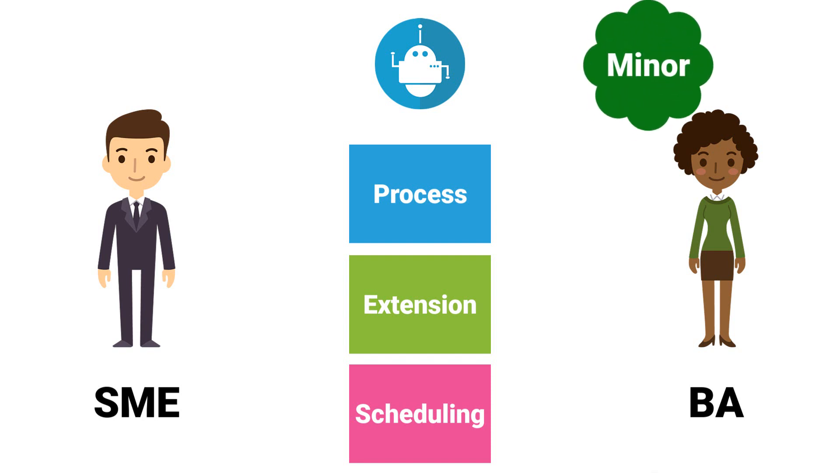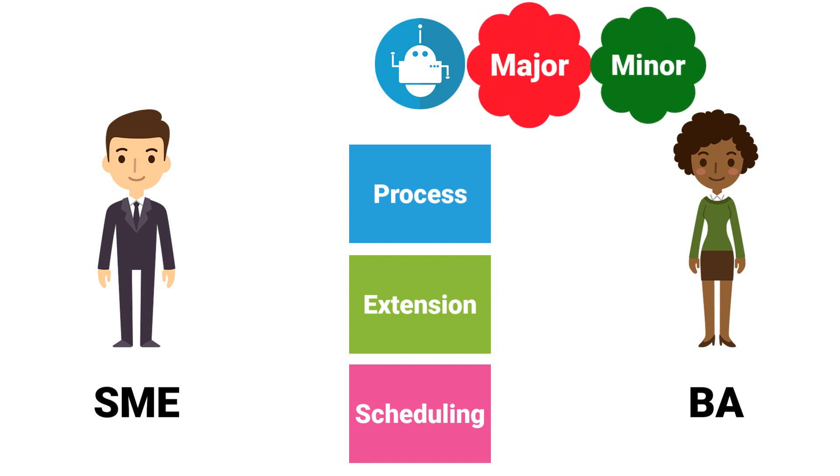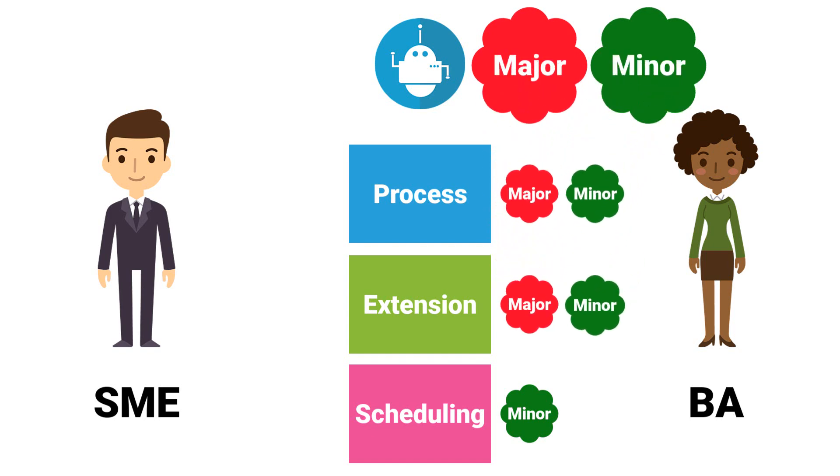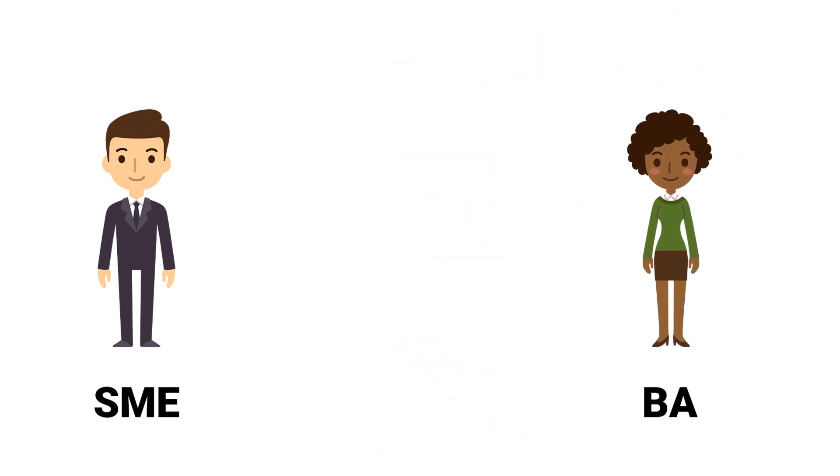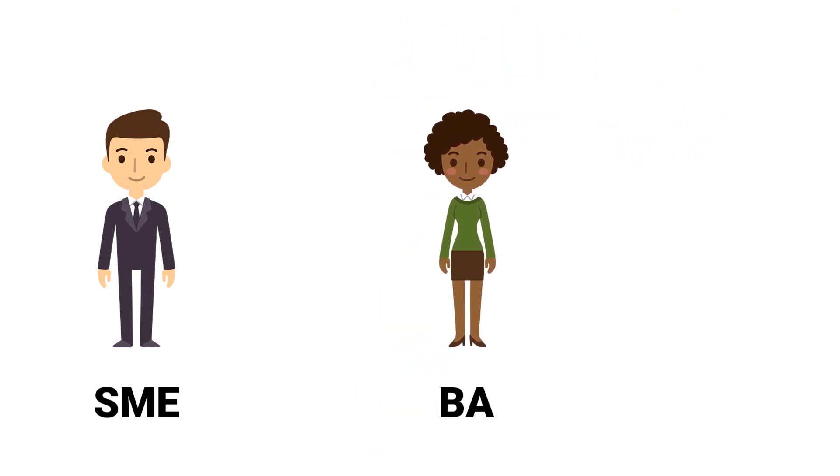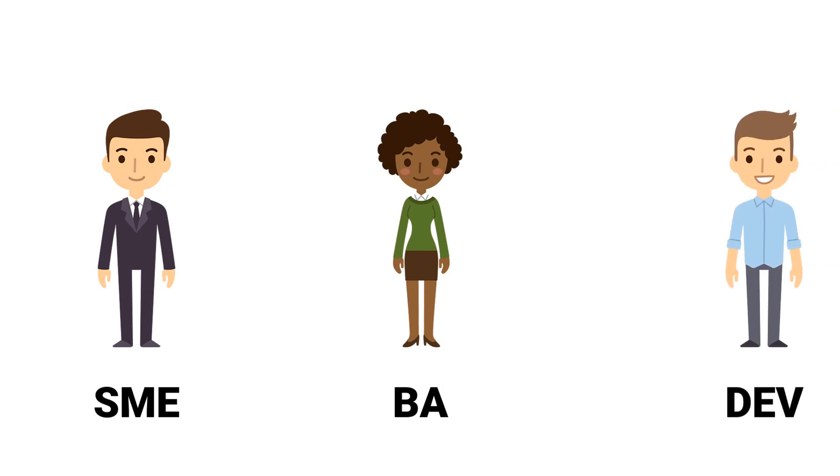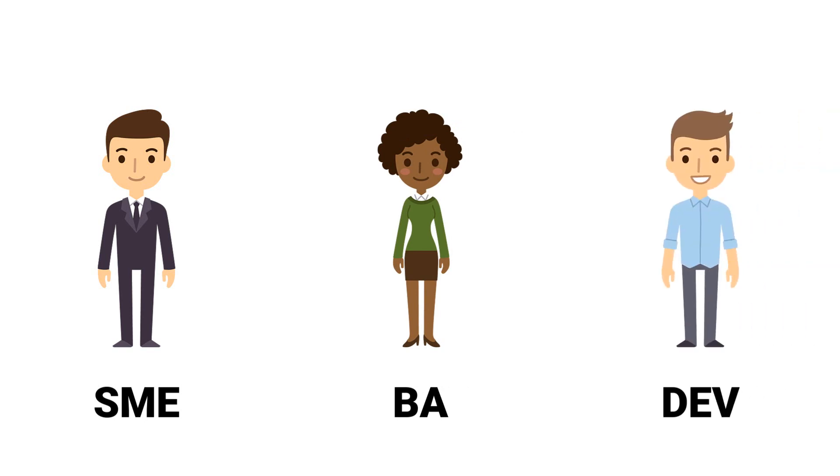It can be minor or major change. Scheduling is always minor change because there is no need to change the program code. But process change or add extension could be minor or major. The business analyst can usually not decide alone whether the change is difficult or easy. Therefore, the business analyst discusses the change with the developer. The developer can then better assess the difficulty of implementing the change.